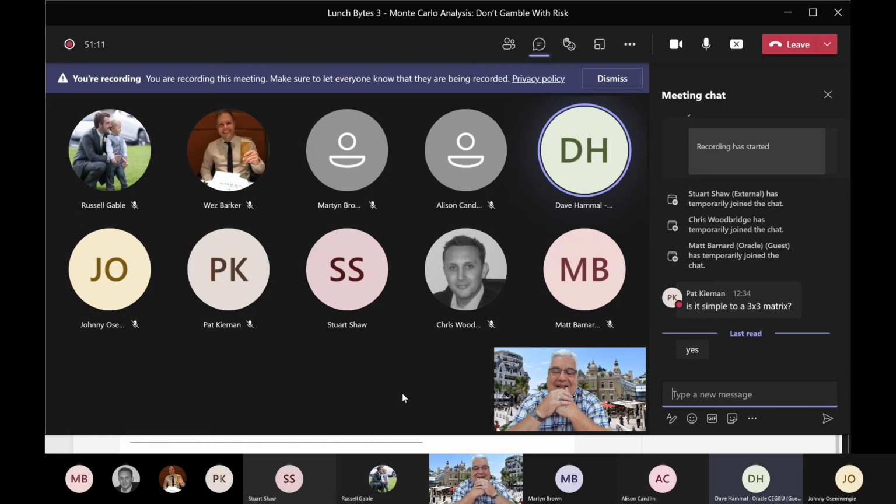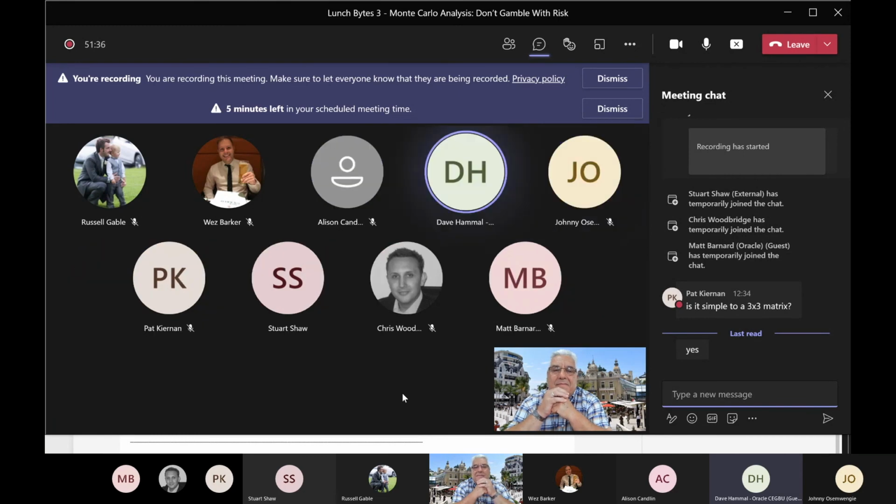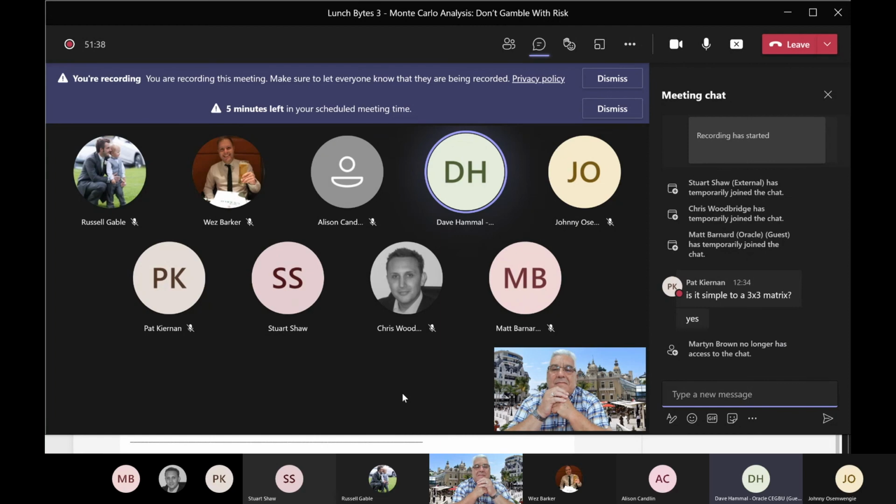But when you're applying the risks, and I'm not sure if you're talking specifically about the connection between risks and activities. When you were in the risk register, and Pete showed you from the risk register how you can see that particular risk, if it occurs, will impact that activity. Sometimes it's easier to do that the other way around. So when you're in the schedule view, on the activities page, you can also select a group of activities and say these are the activities that will be impacted should the risk occur.